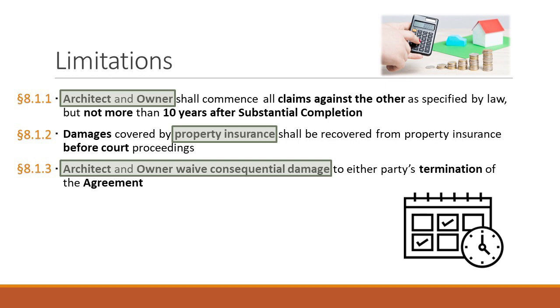And so the waiver here says the owner can't sue, in this case it was against the contractor, but it's the same concept. If the reason why the pressurized system blew up was because of a design error, the owner could sue the architect for the cost to fix the physical stuff that was damaged, but could not sue the architect for the lost profits, the lost revenue that they made because they had to close the restaurant, because that's a consequential damage.